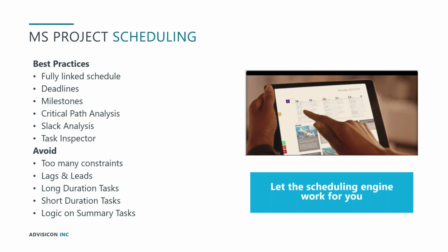We often will say that a fully linked schedule, every detailed task and milestone is linked to a predecessor and a successor, except of course for the first and the last. But that's not 100% true. That's a pretty good goal, and you want to be thinking about having predecessors and successors on every task, or be clear in your understanding of the relationship of your tasks where you don't actually have such a relationship.